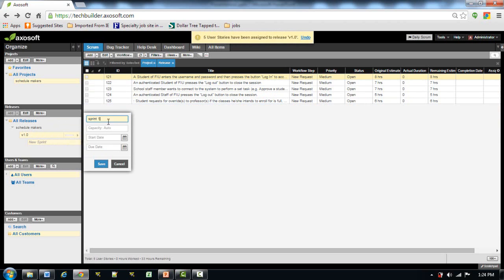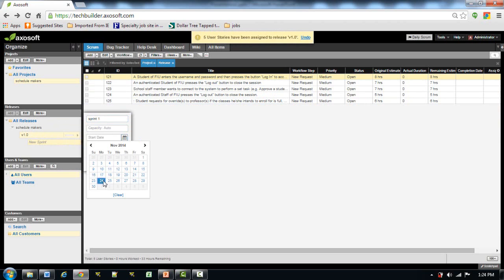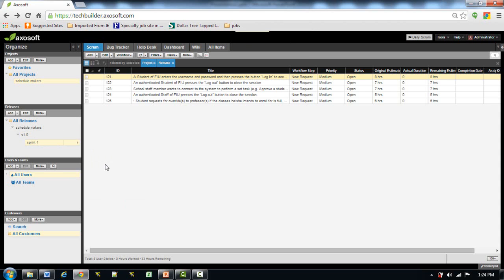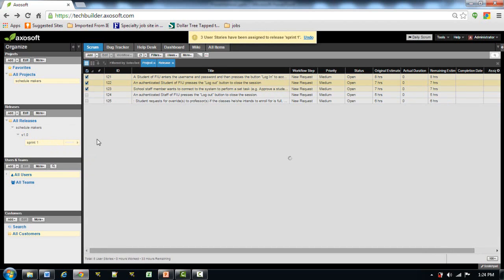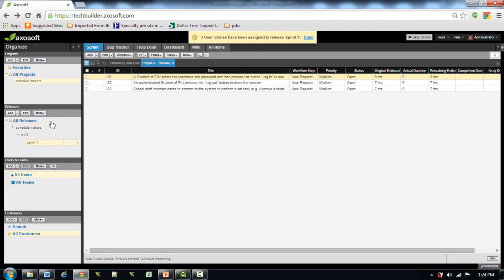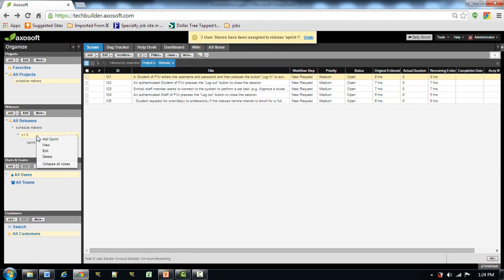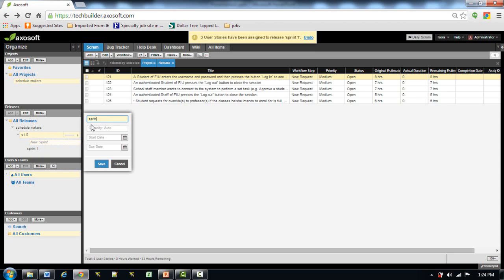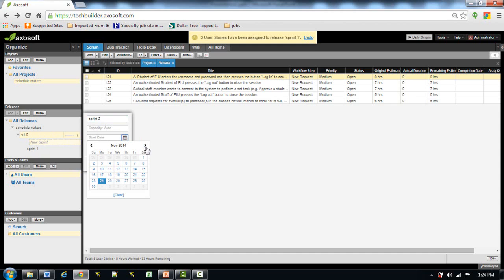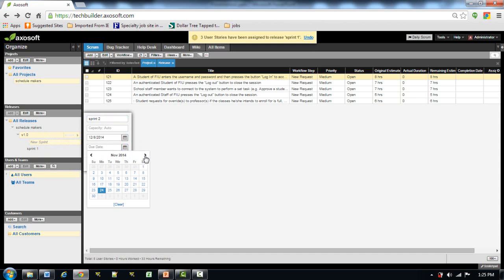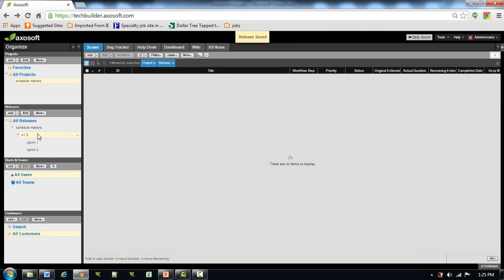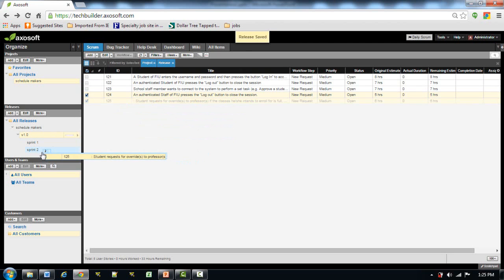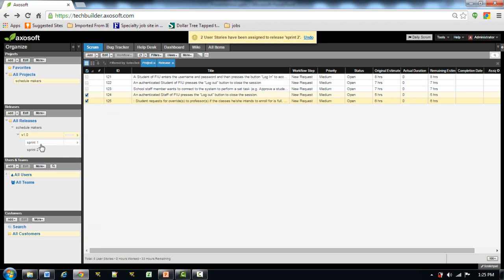Here we will add a sprint, Sprint 1.0. Again the capacity we don't know. Sprint 1 can be two weeks. We select what goes into the sprint, drag and drop, and this would be the sprint backlog. We'll add another sprint, Sprint 2. We ended the first sprint at week 8 and we will end the next sprint when the release is made. Let's add the remaining user stories from the version into Sprint 2, so we have covered all the user stories for this version.